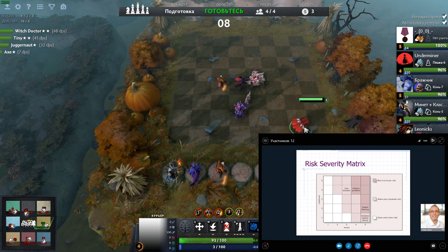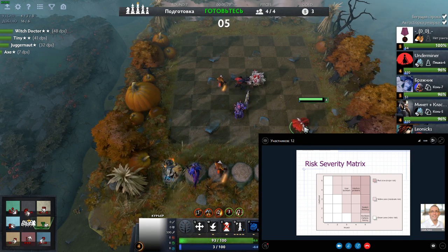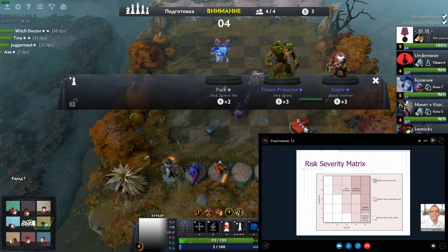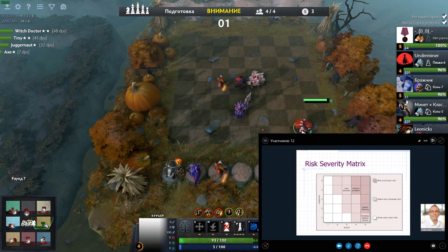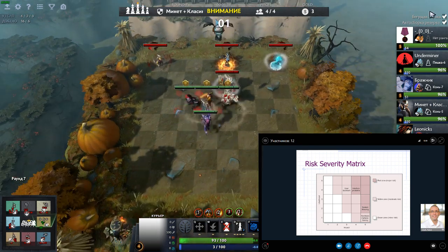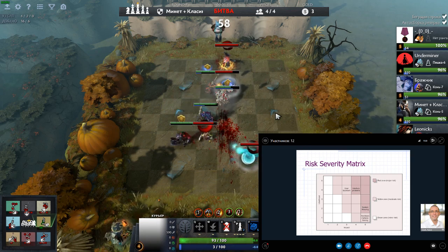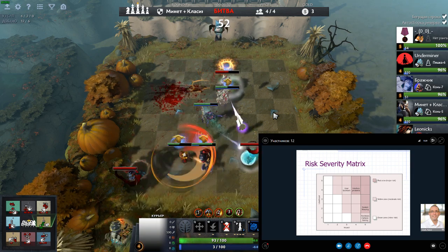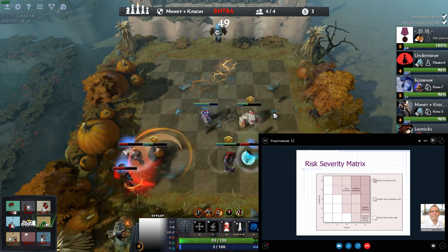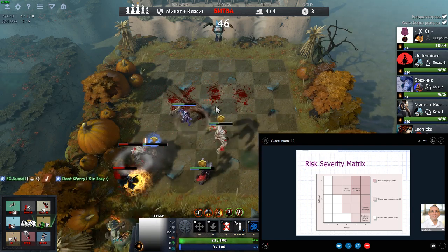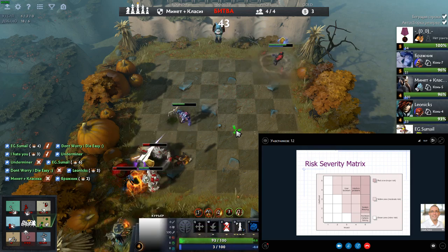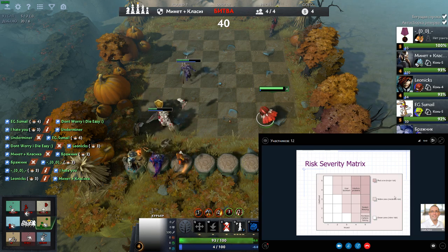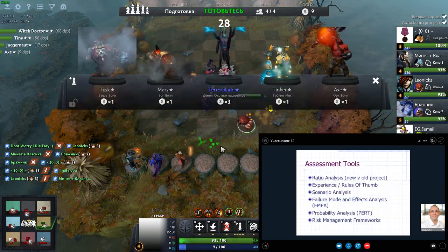As you can imagine, what's identified there as the red zone in the top right hand corner, well, we really don't want anything up there because they'd be classified as major risks. What we want is stuff to be as far as we can down in the bottom left hand corner, because that means if it occurs, it's not going to have much impact and the chances of it occurring are pretty small anyway. But once we have identified the risks, we can then pop them onto this particular matrix and use it as a visual representation that we can share with the rest of the project team.